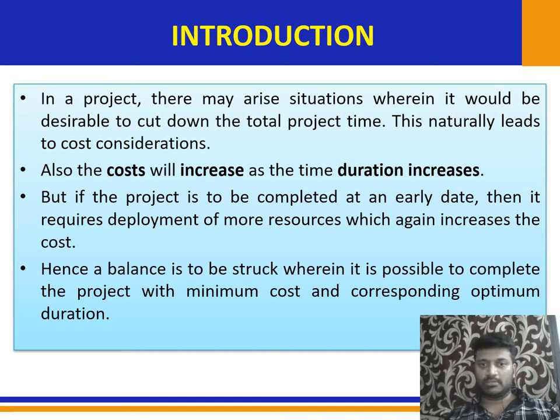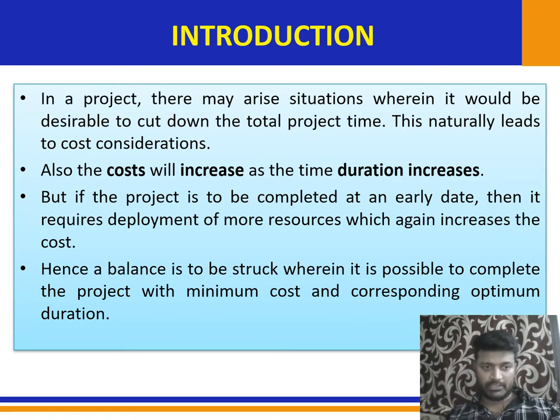The second choice, most probably we won't be doing, that is relaxing the technical specification of such activities, because we will be compromising on quality. So for a given project, there may be a certain range of time during which the project may be completed depending upon the resources employed on various critical operations, and the decision will depend upon whether the commitment of additional resources and expenses is worthwhile or not. The optimum duration will be the one which gives the most economical cost for completing the project.